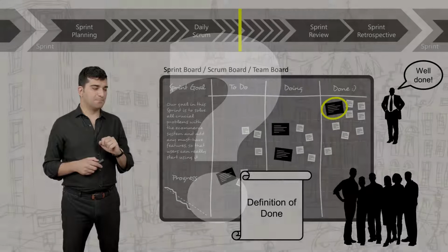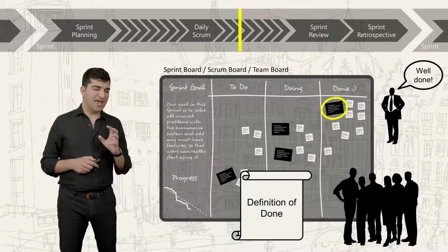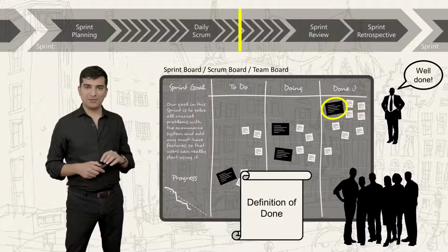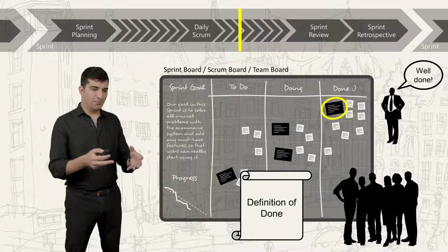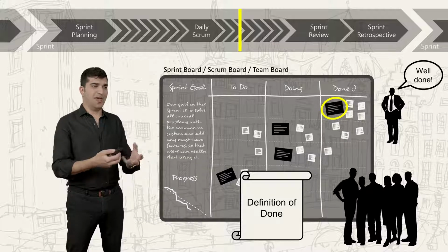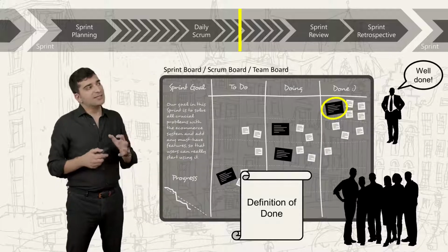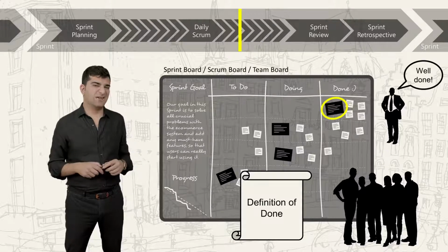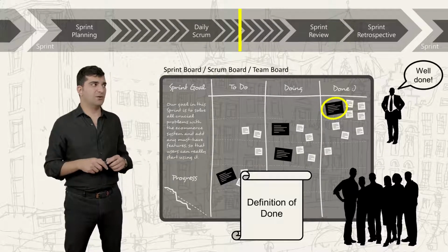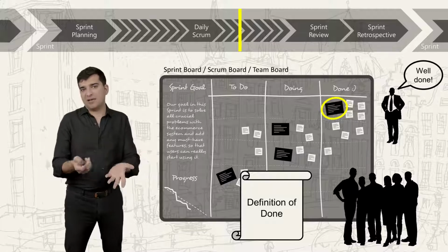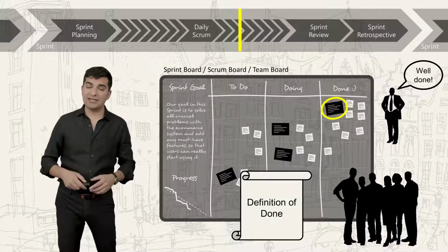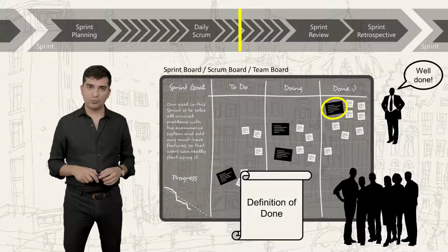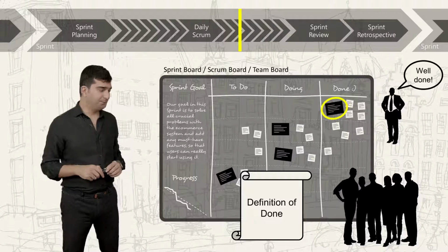That's a good question. And you may answer incorrectly. It is done by the developers because they are the people who know best about the way features work. Still, you may say that the product owner also should have a say on that. For example, when it comes to the reference manual and things like that, which are not really technical, but still in Scrum, it's a responsibility of the developers to create the definition of done.